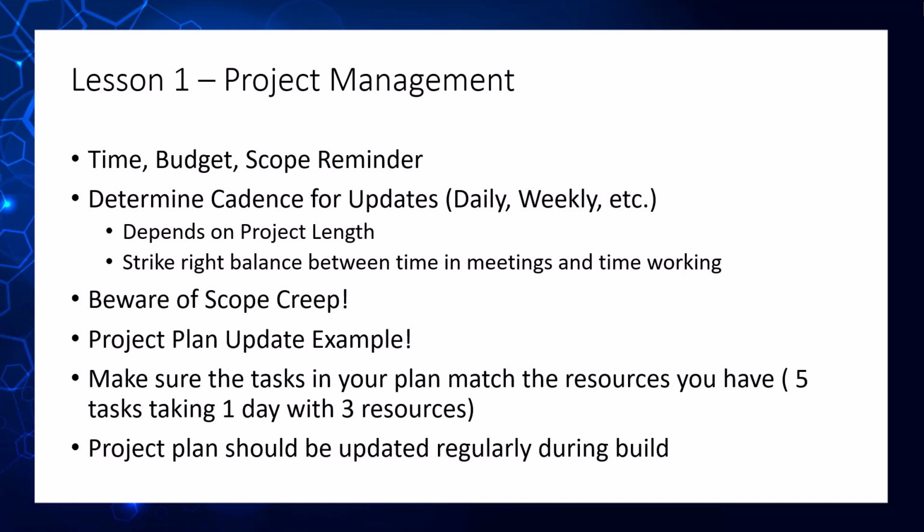Now, that being said, there are times when you are introducing something that changes the entire foundation of the application and isn't just an add-on, it's a core change to the application, where you may want to consider just biting the bullet and spending the extra time and money to get it implemented in your original timeline, or in your original phase, I should say, because if you go and rework it later, it may be more expensive or more time consuming to redo everything.